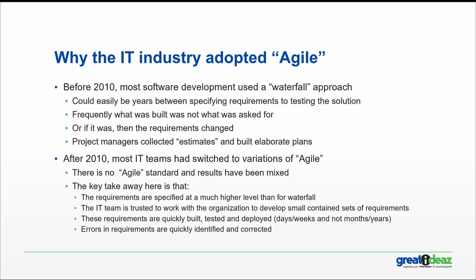So at the requirements phase, you might gather all of the business requirements, and then 2 years later, we've got an application that's ready for user acceptance test. So it could be a very expensive path to failure. And for many projects, it was exactly that. It was a path to fail. It used to take 2 or 3 years, and we get to a point where we're bringing the application back to the users, and the users are saying, well, that's what I said 2 years ago, but either you didn't understand or it's not what I need today. And the issue there is that you've now wasted a couple of years and a few $1 million, and the business still doesn't have what they need.